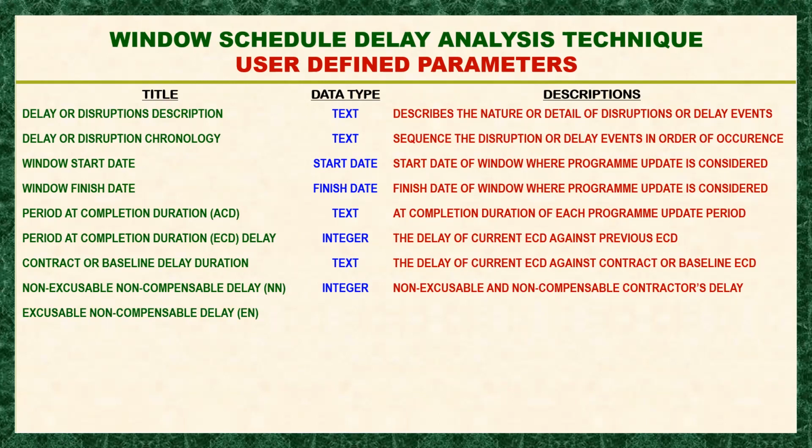So the contractor is excused whenever there is a delay on the project, but they should not be compensated for the delay due to the typhoon.